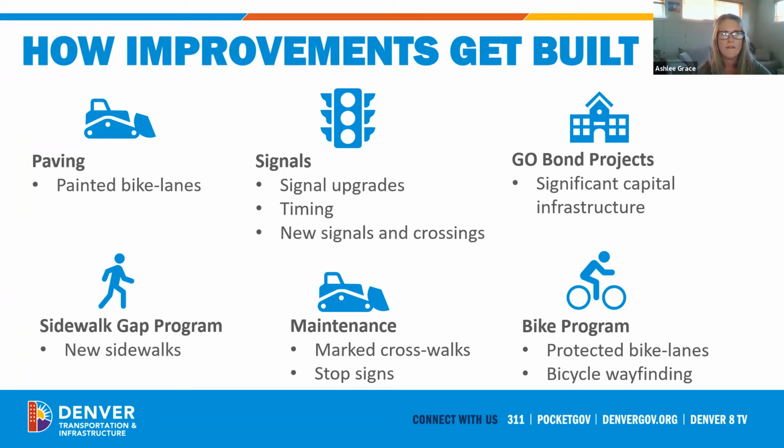So we're working hard to really align a lot of our projects so that they are coming in at the right time as it relates to paving, so we're not tearing up freshly new asphalt, et cetera. And with bike lanes in particular, we're able to install a lot of bike lanes very efficiently and effectively by following our paving program.